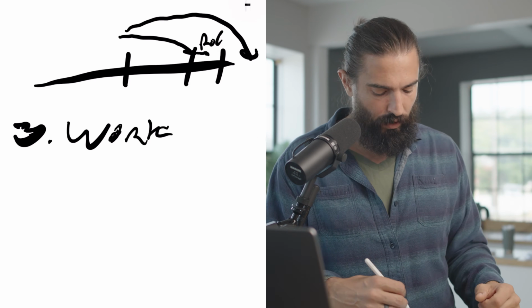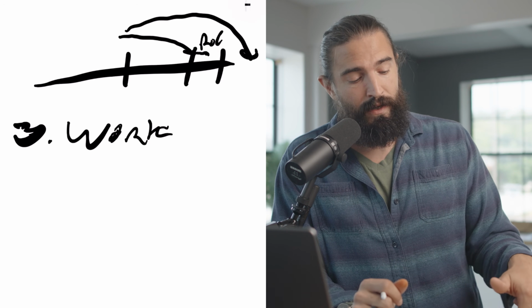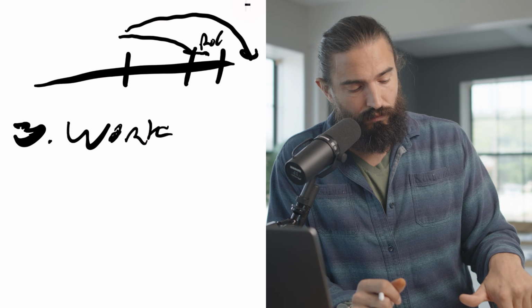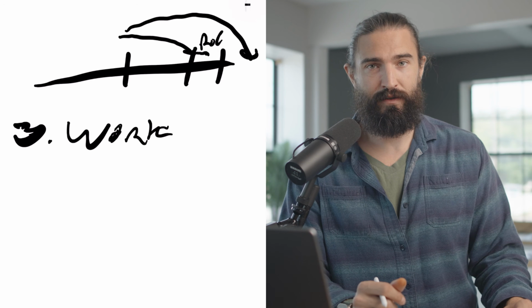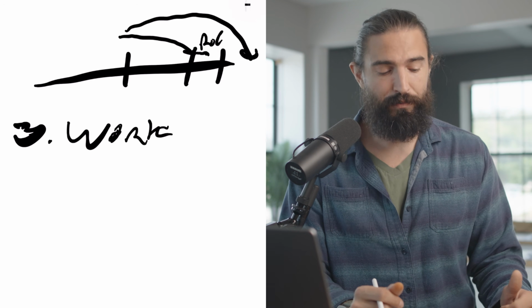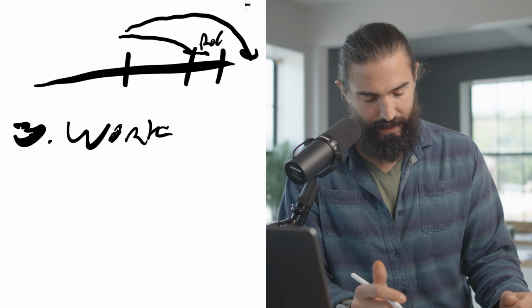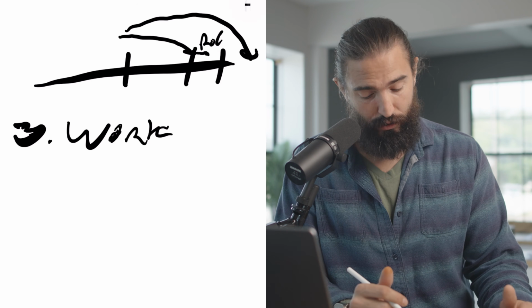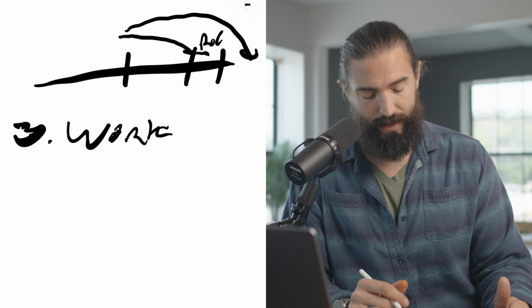Biggest thing with the work, always got to be ahead of the money with the contractor. That means that if they bid a job, or a grouping of jobs for $10,000, okay, and they ask for 50% up front, I'm going to say, dude, I can't do that. And they're going to say, oh, that's the only way we do it. Then you're going to have to do it with somebody else. I'll find somebody who will do it the way that I want to do it.